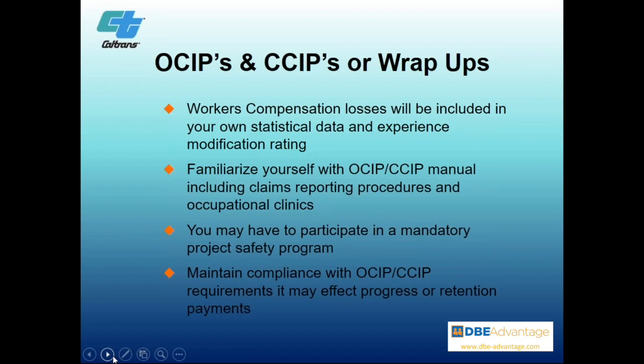Workers' compensation losses will be included in your statistical data and experience modification rating, meaning that if you have a claim, they're going to know it. And every time you go for another premium, they're going to review the basis, and any claim that was in there will be viewed and evaluated as to how that affects your premium.